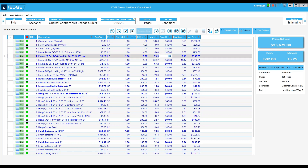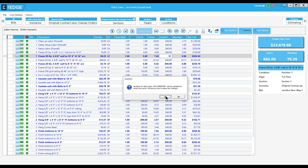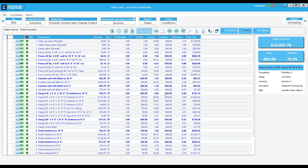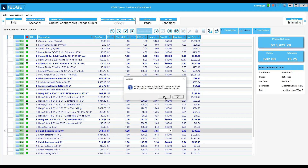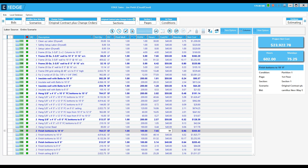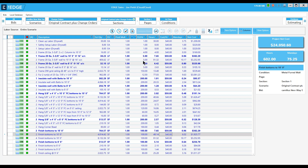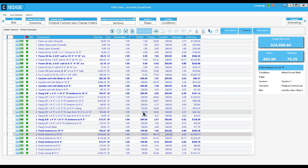I will make a minor change to the labor. I come over to the labor screen and see the same kind of thing — the grayed-out numbers are not editable and the bold numbers are editable. In this case I'm going to change the wage rate. I can also change productions or anything else I need to. That's all I wanted to change here.